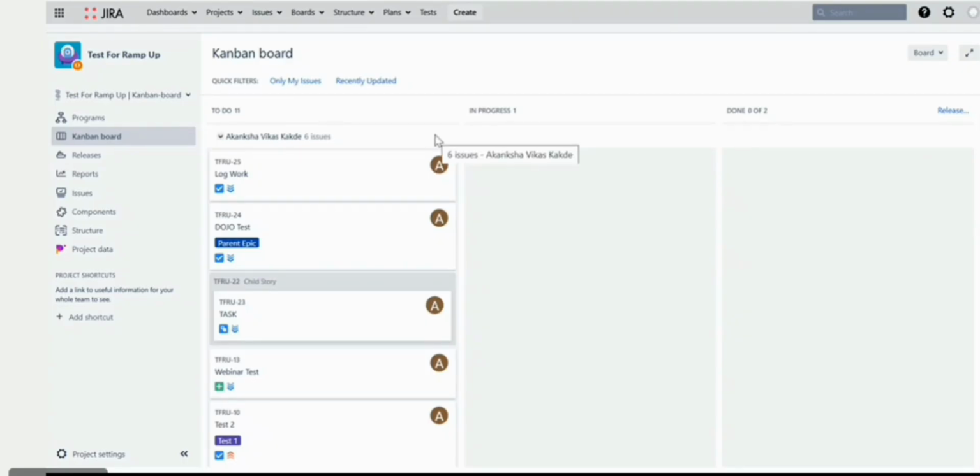While in Scrum, you cannot pick a task in between, as the sprint is already started, and if you pick a task in between, it will hamper the report. While in Kanban, you can pick the task as per the capacity of the team.